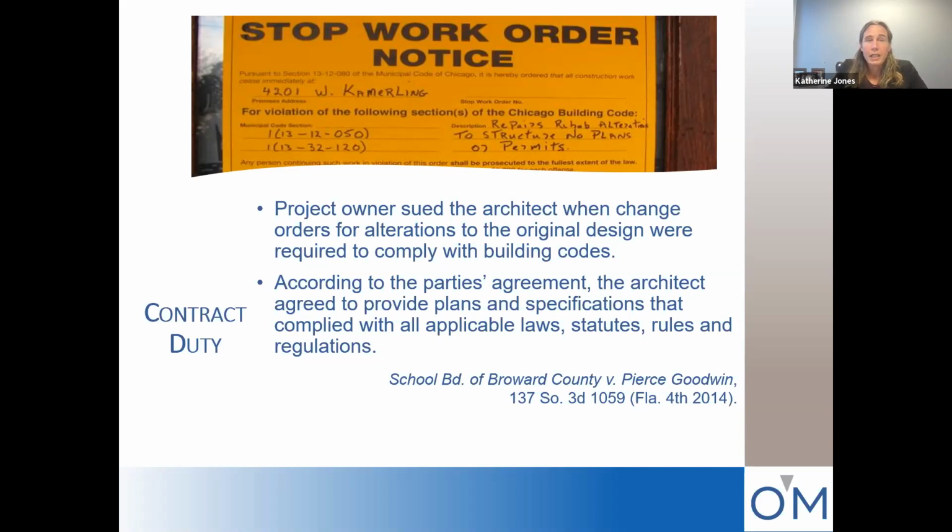As you can probably guess from the fact that we are still talking about this case almost a decade later, the school board came back and said, oh no, there was a misunderstanding. You need the staircase. Now we have to put through yet another change order in order to construct the staircase, and it's going to cost us a ton of money. And Pierce Goodwin came back and said, look, we got a verbal okay from you that we didn't need to construct the staircase, but even more importantly,